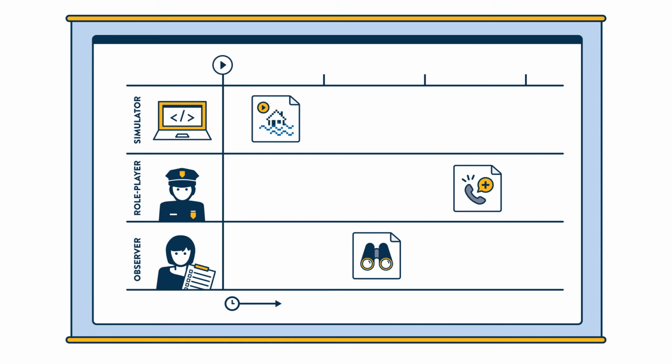As you want to finish the day with a focus group interview session and you have to start the day with a good briefing, you assume that the action part of it can take no longer than 5 hours. To achieve the results in such a short time frame, you decide to focus only on the exact moments when the gap emerges and when the solutions come to play.